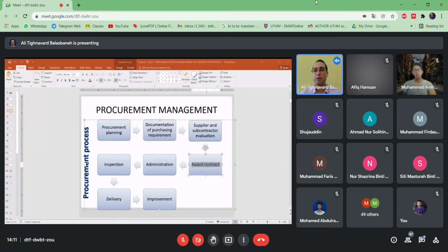So you know, not everybody can do that. There are only 3 suppliers who have this ability, this budget, this power to do that. So if you choose only these 3 companies and invite them to attend your tender, you are saving time. Because which one is easier? You just check 3 tender documents, or you check 100. Of course, 100 is really time consuming and you have to spend a lot of time. But 3 is easy.